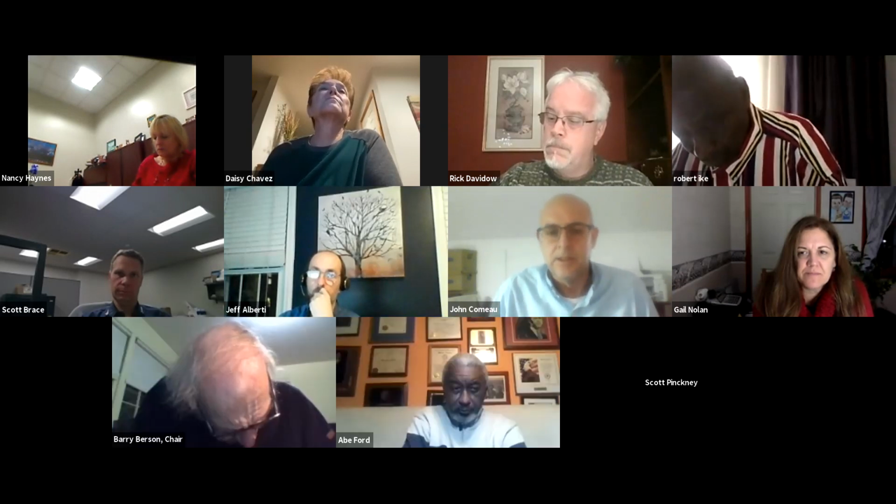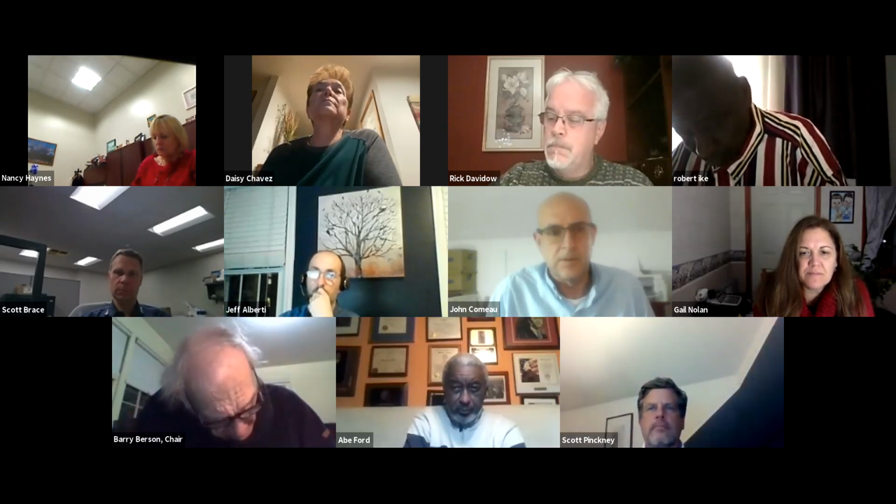Who do we pick here? We have two representatives. You can go in alphabetical order. I'll speak, Barry, because I'm the most familiar with the project. We're continuing to review closeout documents. Have one more visit to the site to do a back punch on the punch list, just to check the punch list for completion. And we're still, obviously, attending meetings and supporting the project by answering RFIs as they come in. So we're getting near the end. We keep saying that.